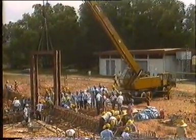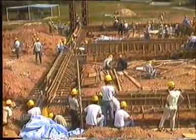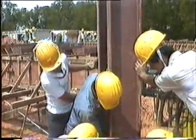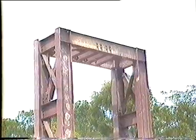On top of the temporary footings, we install these steel lifting frames which will be used to lift up the tin shell roofs. The lifting frames are fabricated and positioned carefully on top of the footings. Then they are firmly installed by means of these anchor bolts.